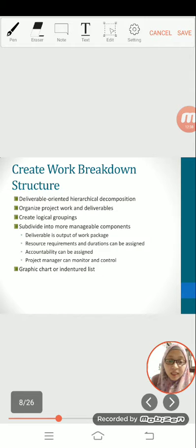The WBS should be deconstructed to a level that identifies individual work packages for each activity for each specific deliverable listed in the project scope document.